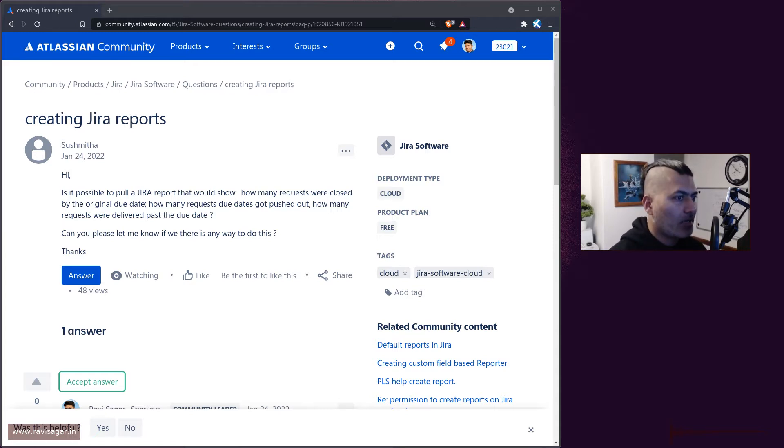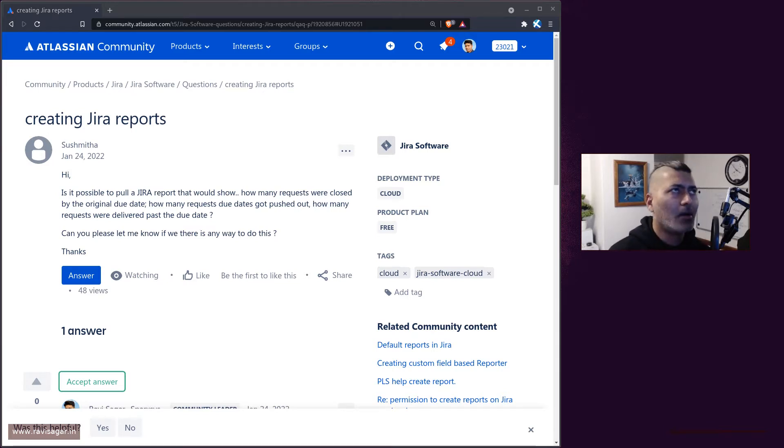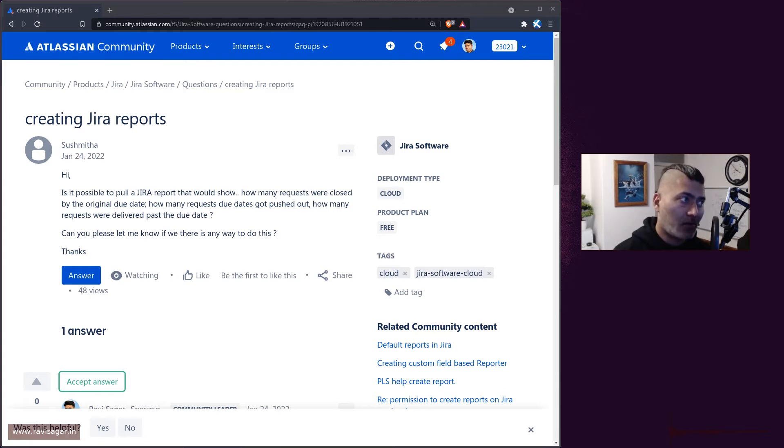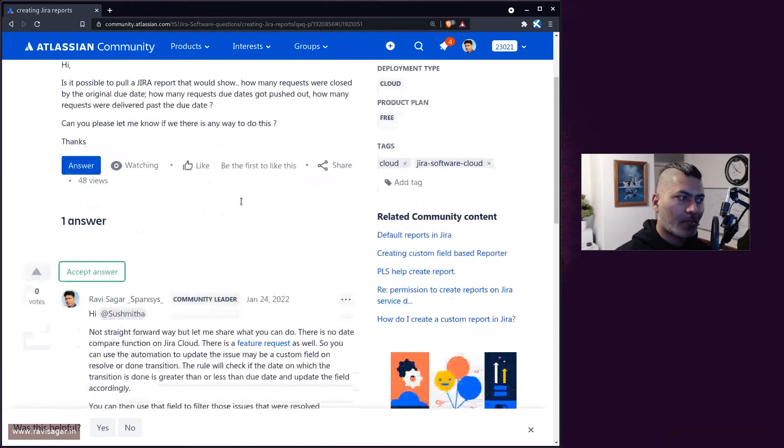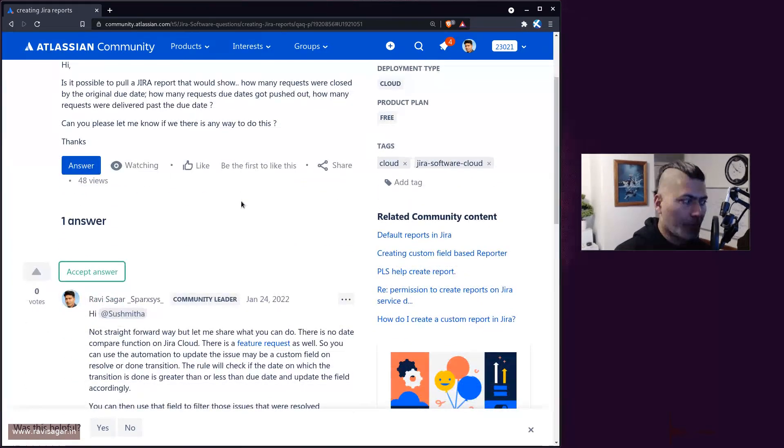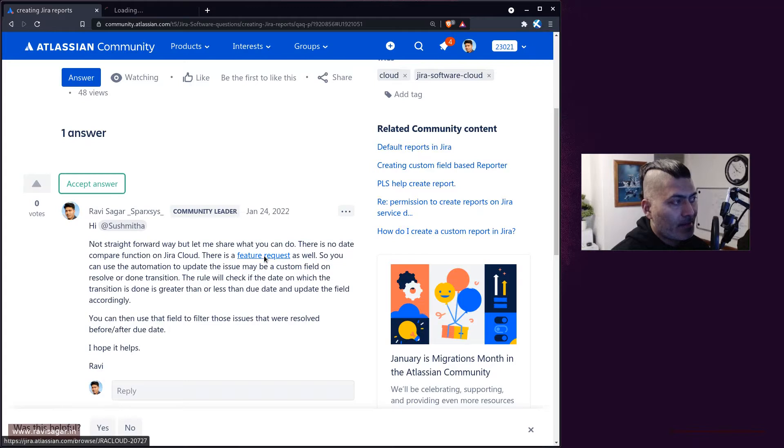Unfortunately, this is not really possible on Jira Cloud, I guess also on Jira Server, without using any app. If you are using ScriptRunner for Jira on Server you can definitely do that, but on Cloud there is no way to do it. There is also a feature request, by the way.